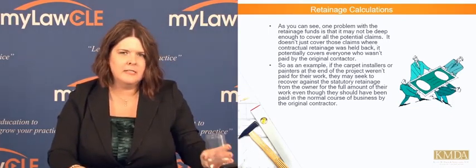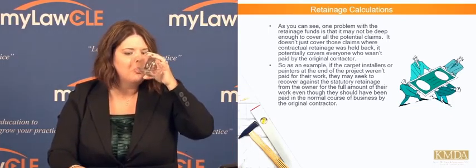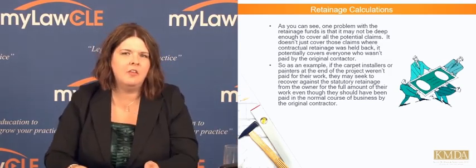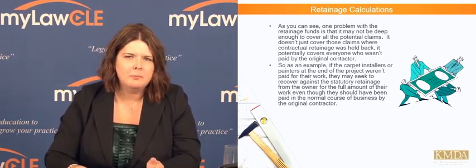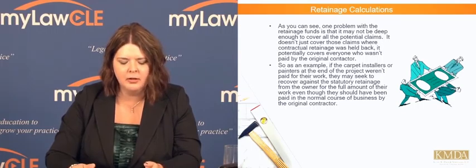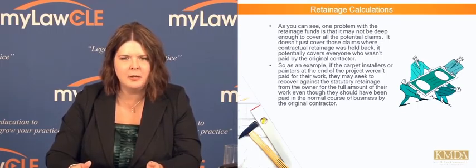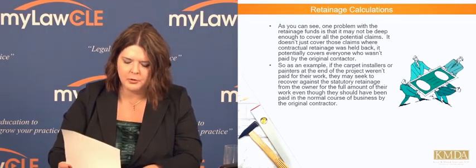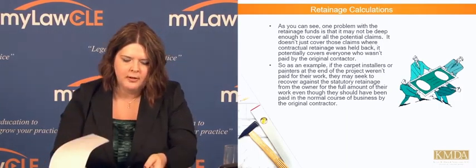So it makes it really, really difficult because we have to have the liens actually filed by the day on which the deadline falls. And some counties in Texas for us are very, very slow. So if it says by the 15th, we have to pretty much make sure we send it out at least 5 days in advance. So know your mailbox rules.